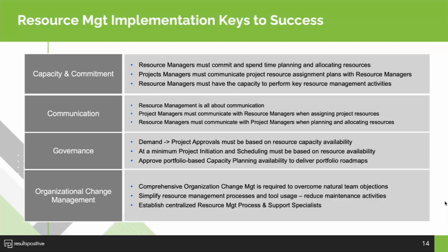You know, we've always had the question, well, if someone's going to leave for a day or two, do I need to update my resource plans and resource estimates? We recommend not doing that. Keep it 80, 90% accurate enough so you can make the proper decisions, but not overburden the organization. So setting the expectations on the accuracy threshold we found is really key. And that'll help with your adoption.